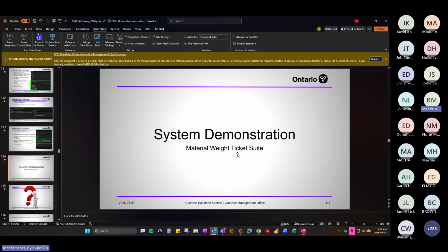The reconciliation won't allow you to pay over the tender item quantity, so you can't take it that far. But as far as posting it in your diary, which is a record of the quantity that was installed that day, we want that to be accurate. We don't want it to say 12 when it was really 14, because we'll never know that it was 14.